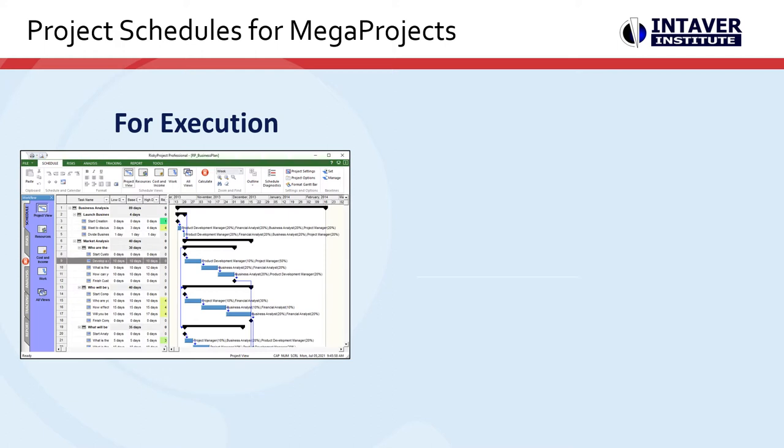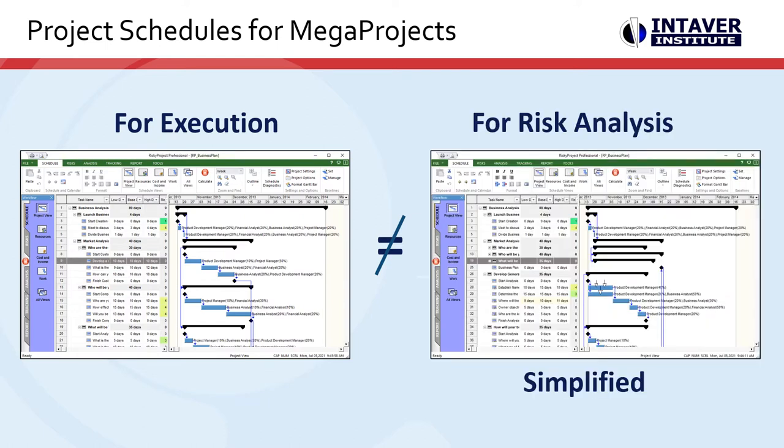Scheduled risk analysis requires a high quality schedule and can be complex and lead to many errors. To overcome this, the schedule for project execution may not be the same as the schedule for risk analysis. The schedule for risk analysis can be a simplified version of the original schedule, but this can lead to questions of whether the analysis is realistic.